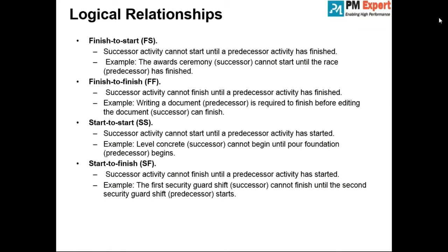Where exactly are we going to use this? We usually do that less. For example, in software projects, not at all. But yes, when you talk about infrastructure projects where there are chances that inventory might get accumulated because there's a cost associated with inventory, like in data centers, you will use this. Sometimes in operations also we use it, because based on that, we are providing the facility or something.